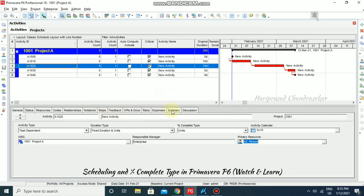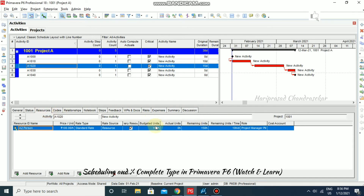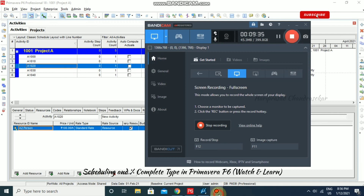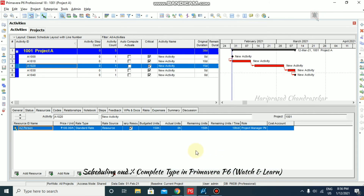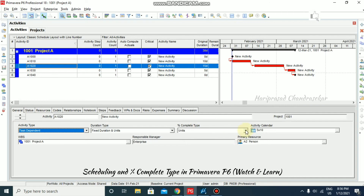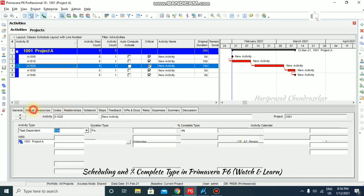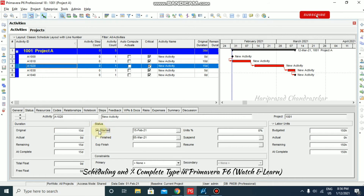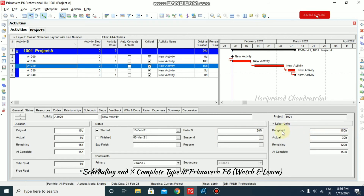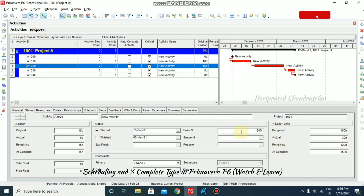Now going to the resource tab, we can see the budgeted units and remaining units. Going to general, selecting unit completion type, then status — now we can start it and input a unit percentage, for example 20%. It won't update any duration but will update labor units. Budgeted is 150 hours, 20% complete means actual is 30 hours, remaining is 120 hours, and at complete is 150 hours.